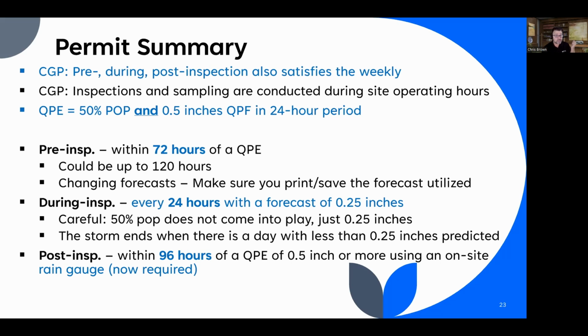The 30-day QSD project commencement inspection that I did yesterday also satisfied the weekly. It also satisfied the annual inspection. So there is a lot of overlap. Inspections and sampling absolutely need to be conducted during normal site business hours. That's a safety consideration. We're not collecting samples at night or on the weekends if they're closed, or outside of business hours. We're not required to do these things.